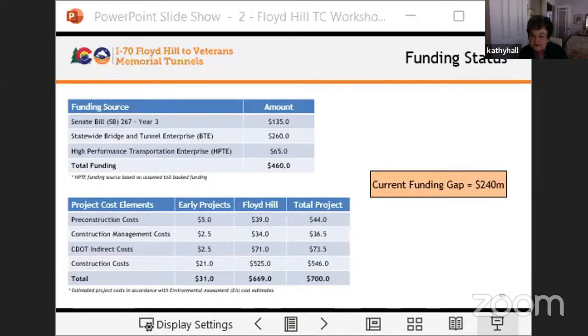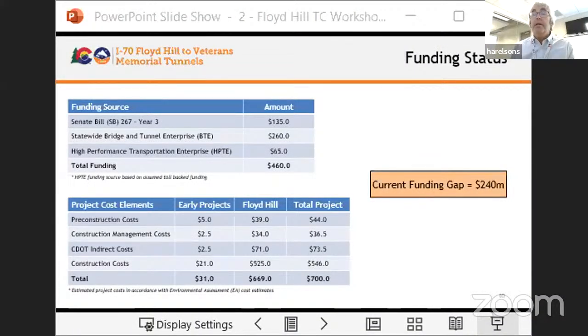So Commissioner Stanton. Thank you, Stephen Keith. Appreciated the idea of phasing opportunities and trying to save money now over a long-term question. With inflation approaching 10%, and costs for building materials, concrete, et cetera, going up, have you factored this in long-term for the whole project? In other words, what's the cost escalation potential? So our EMA group, the engineering estimates and market analysis, is keeping track of inflation. We're seeing currently some bid acceleration. I think not as extreme as in other parts of the economy, but that's something we have to keep our eye on. And again, that's another argument to go ahead and bite the bullet and do both phases now if we are facing 7 to 10% inflation moving forward. Thank you.